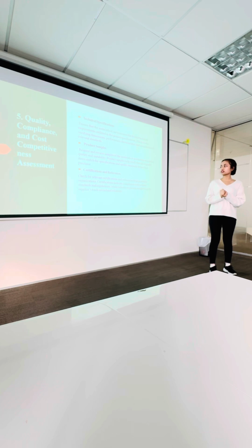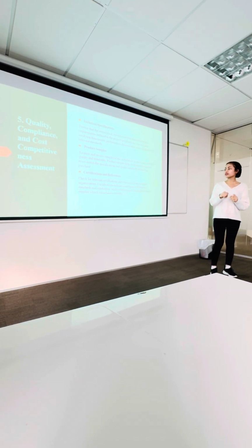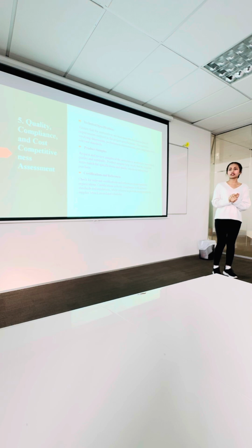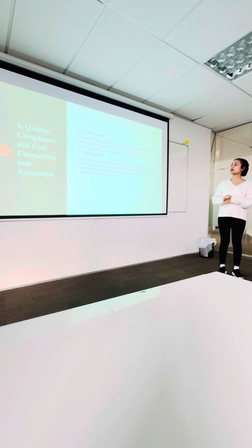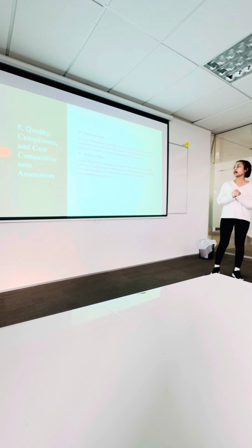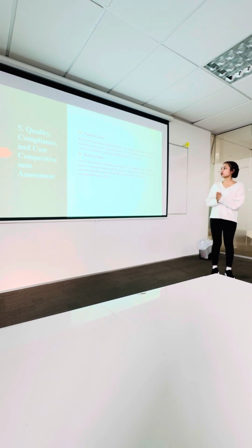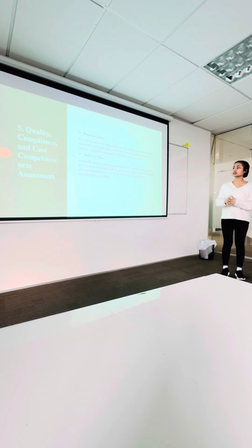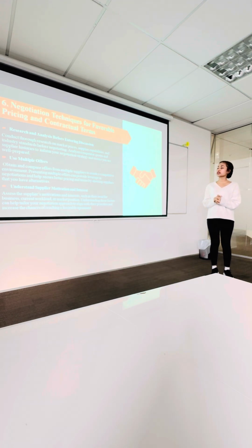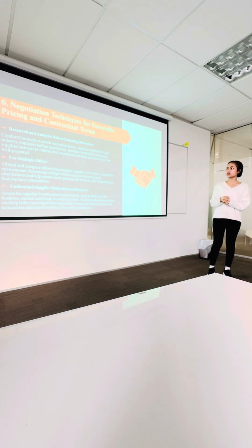And there's the certifications and references. Checking for the relevant certification and references from reputable organizations provides insights into the supplier's track record and reliability. And there's the payment terms. Favorable terms can improve cash flow and the financial flexibility for the projects. And the delivery time is also relevant for avoiding delays in construction projects.